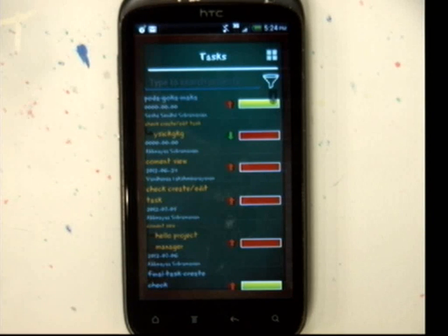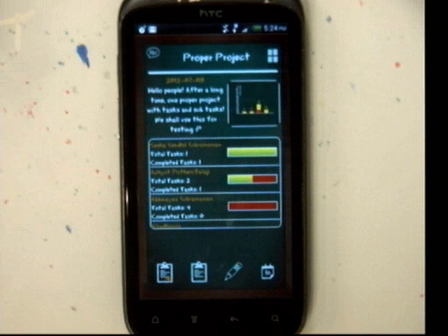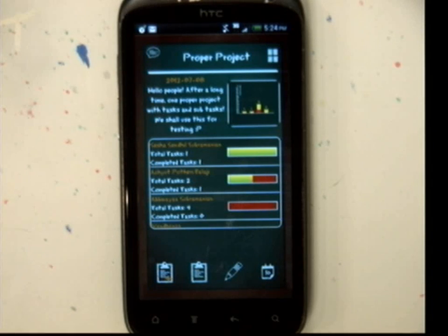So coming back to the project view, the progress of each project, as I said, is calculated based on its subtasks. And for each subtask, it's calculated based on how many are there below it. So if it's a bottommost task, then it has either only 0 or 1. It's completed or it's not completed. So that's the way we handle the